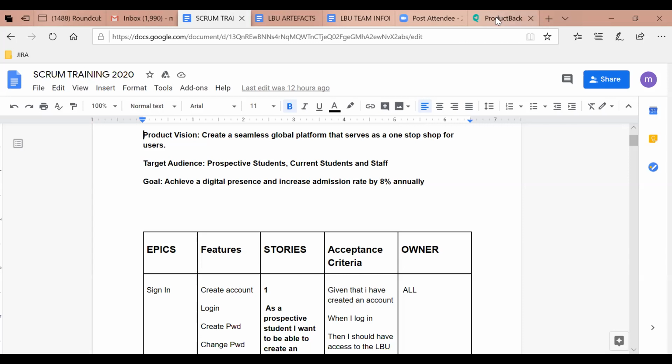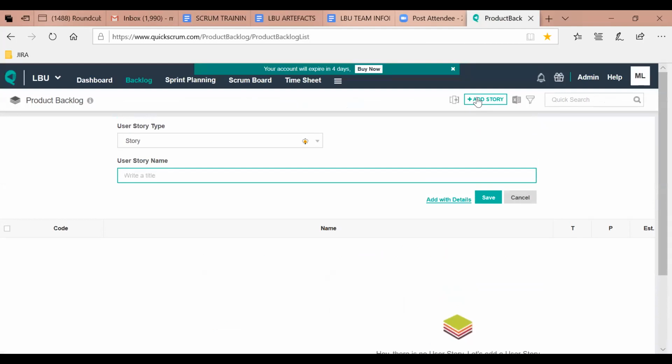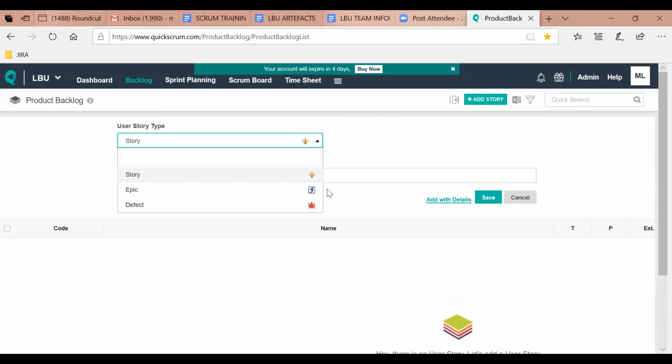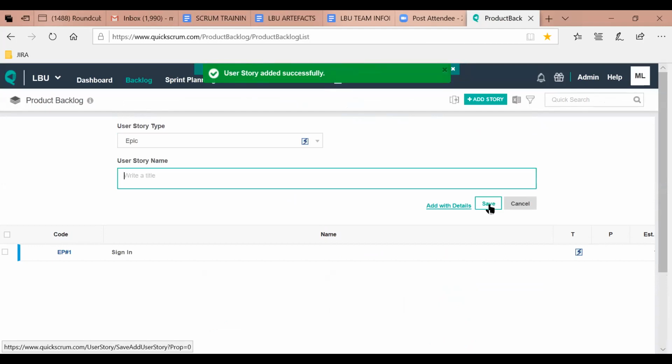So if I go back to the product backlog, I'm going to say add story. And I know that the story I want to add now is an epic. So I'm going to come here and click on epic. What is the name of the epic? Sign in. Yeah, that's the name of the epic. Sign in. And I'm going to save it. The moment I save it, as you can see, it's showing up there as an epic already.